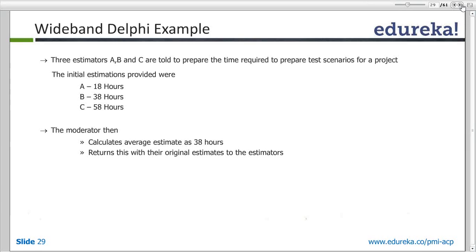These are very basic, simple things, because obviously the observers and the product owners would be resolving their queries as well, right? At that particular time we might change the estimate to 18, and then the final estimate for that story would have been 18. But in cases where neither one of them is ready to move, then the average is taken.